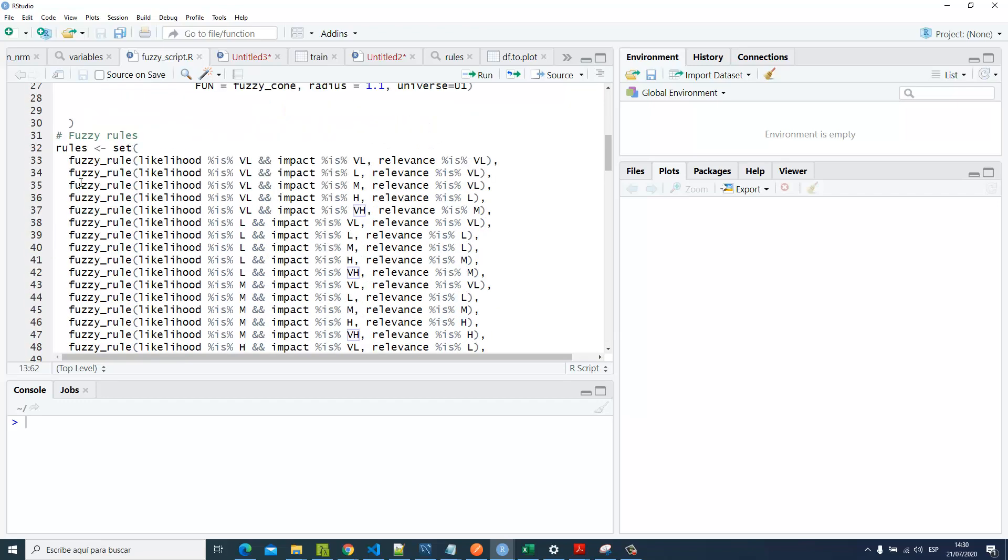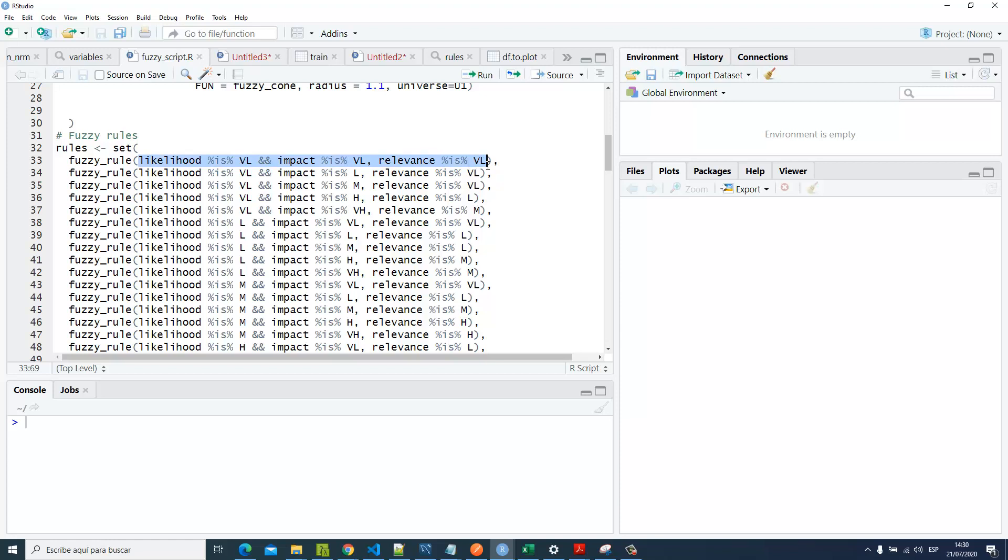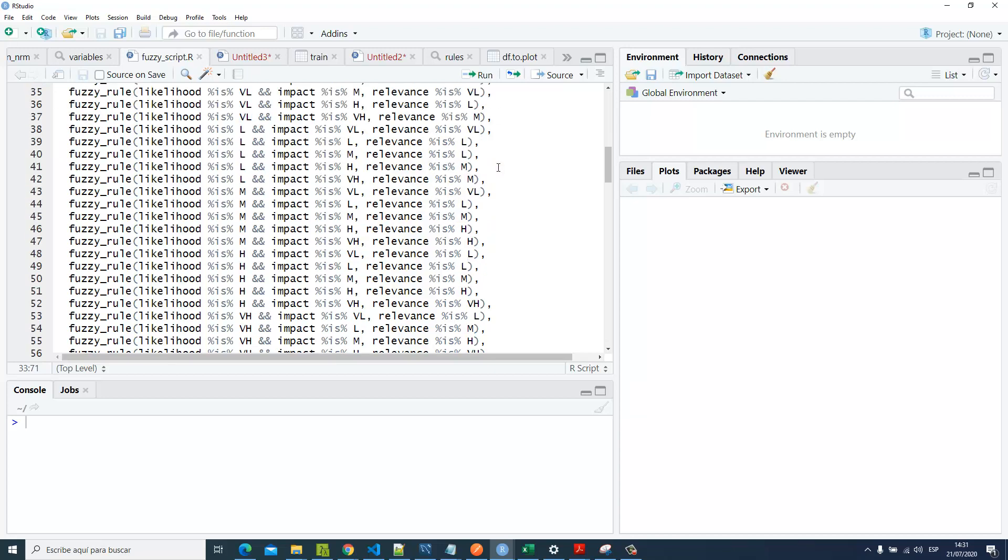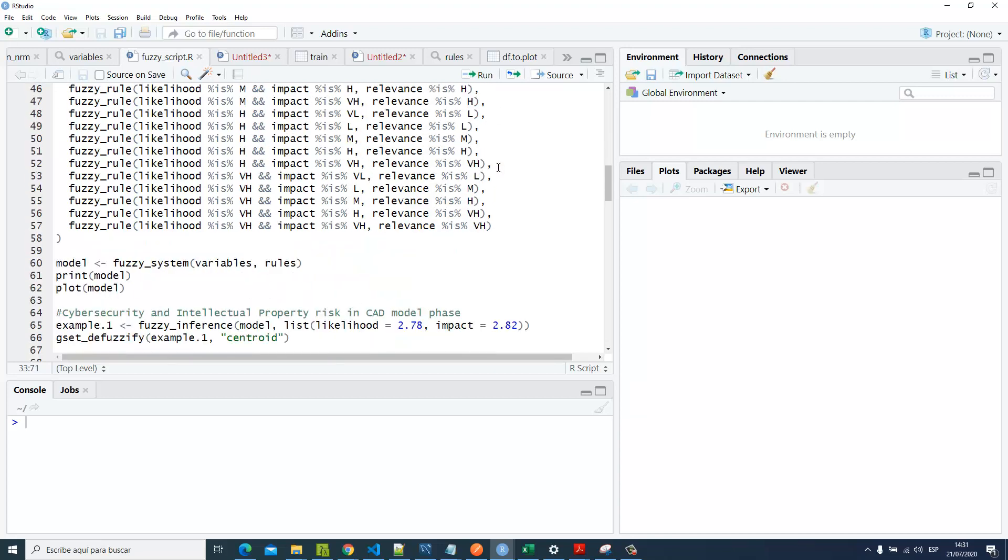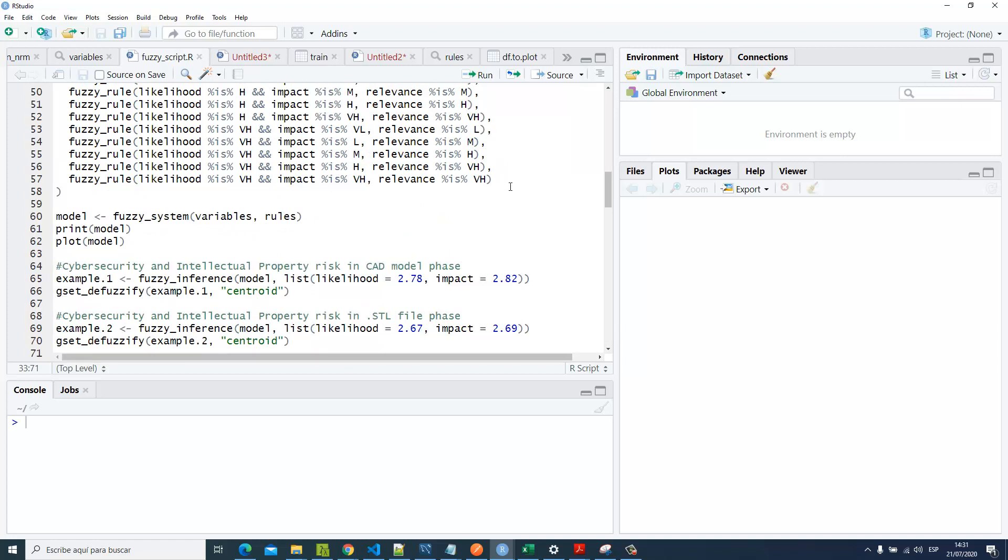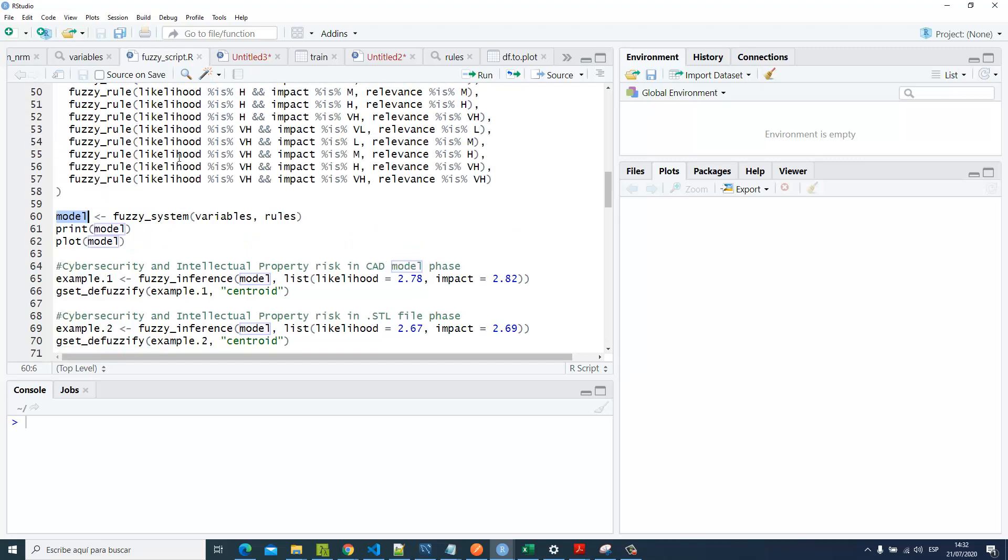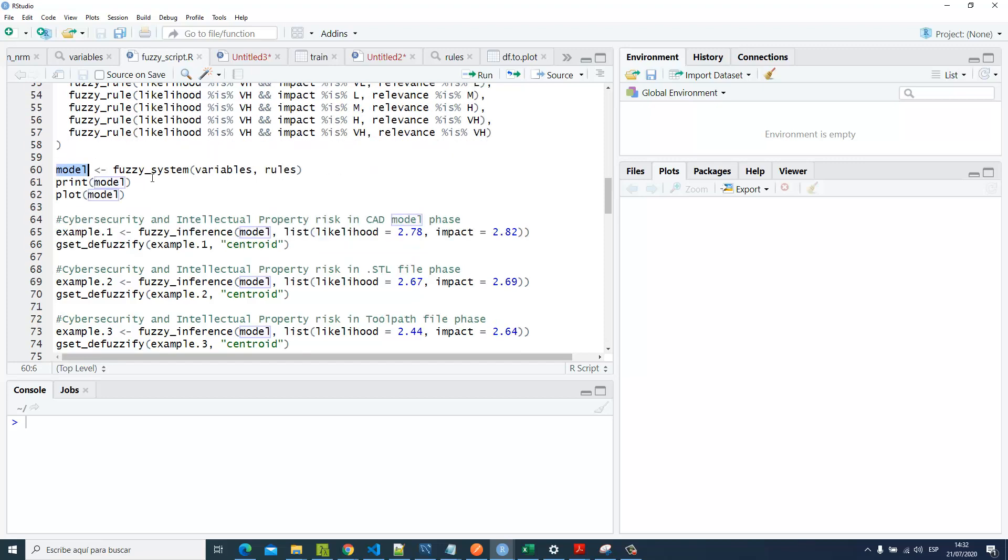Then we've got the fuzzy rules. We're setting up the rules according to our fuzzy rules matrix. Here we've got: if likelihood is very low and impact is very low, the relevance will be very low, and so on. Here we've got our variable model to run our inference system using the function fuzzy_system, inserting as parameters the variables and rules.